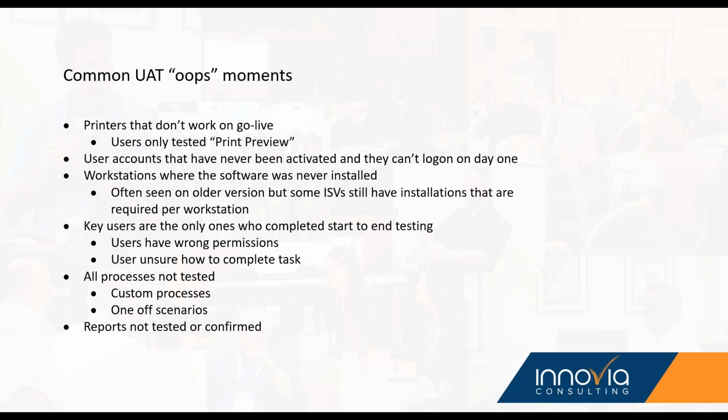My opinion, no. So when I went back and had a conversation with this person and explained the reasons for my thoughts, he had a very valid reason, but he's a sales manager, not a warehouse person. I need the warehouse telling me what they need on that pick ticket to make them successful.